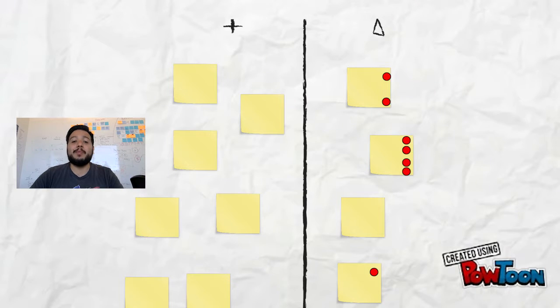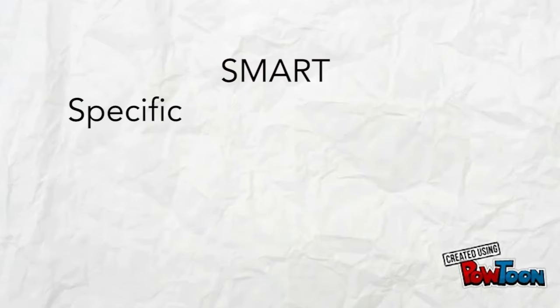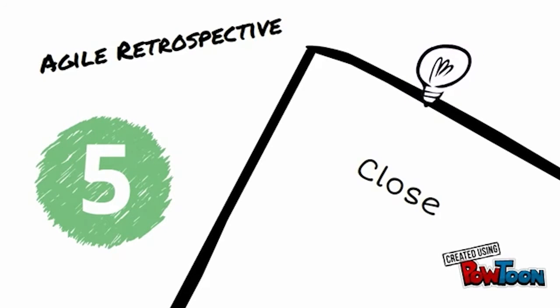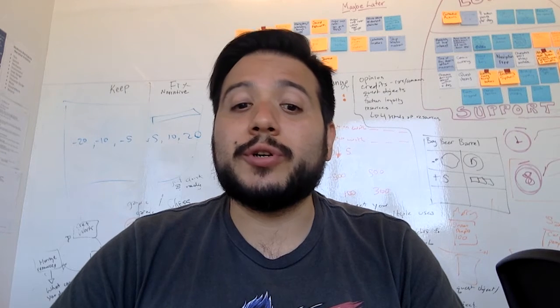Also focus the discussion towards what you're going to do as a team to improve the delta you've agreed to be important. Remember that the outcome must be an action plan. You must come out of the session with a clear idea of what you're going to do, when you are doing it, who is doing it, and how. Remember, your action plan has to be SMART. Specific, measurable, attainable, realistic, and timely.